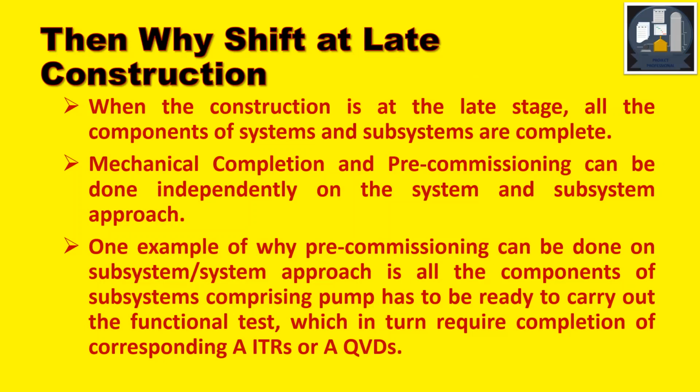Second, the mechanical completion and pre-commissioning can be done independently on system and subsystem. Pre-commissioning, if you have to do it, you have to do based on the subsystem.